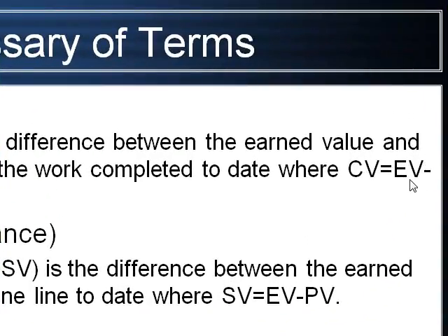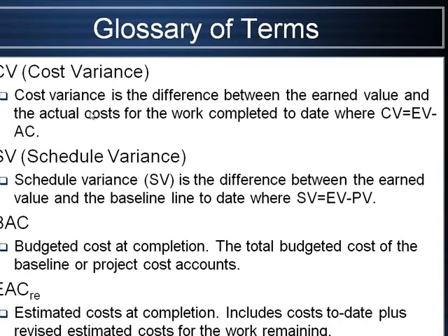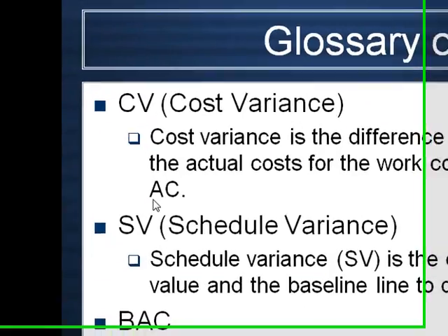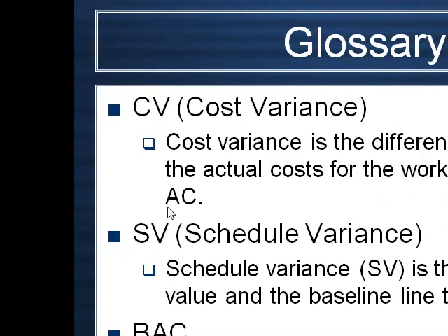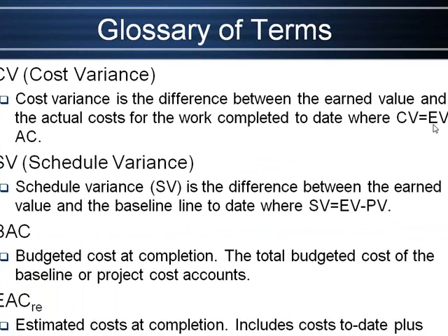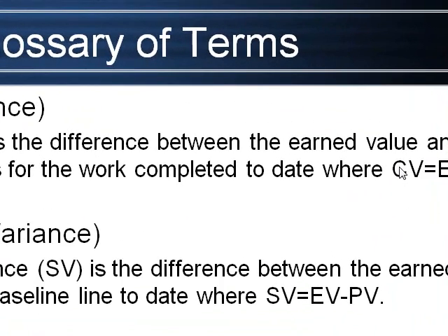So, for example, if we're 20% of the way finished, and the project was going to cost 200,000 dirhams, that would be 40,000 dirhams, and we'll subtract what we've actually spent. So maybe we've only spent 35,000 dirhams. We have 40,000 dirhams minus 35,000, and the cost variance is positive 5,000 dirhams. Now these are the exercises that we're going to do in a few minutes.